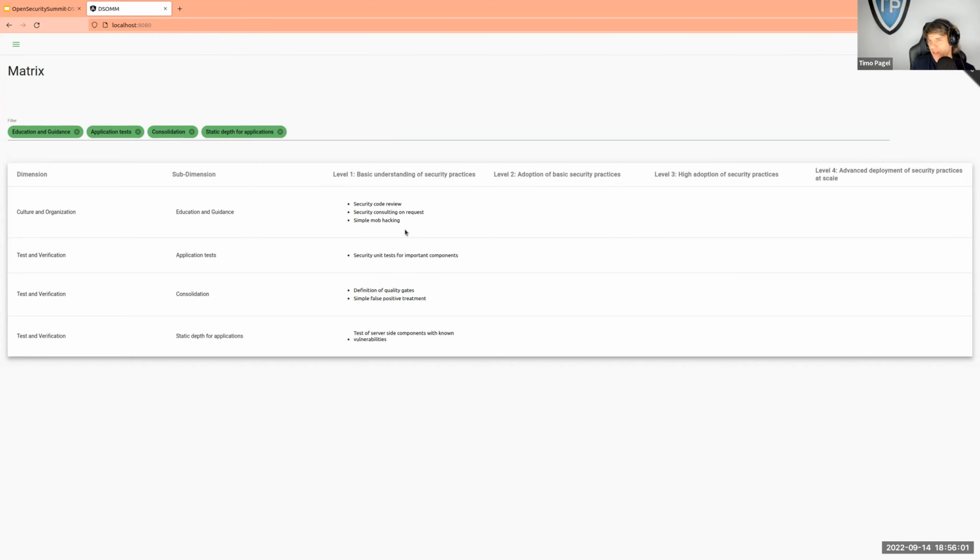When you actually implement it, each of these is like a project. And when it's a project, then you would track it in Jira, for example. But you're going to have specific tasks, right? When you talk about setting up a code review program, there are going to be 5 or 10 things that you need to do. And then if you have multiple teams doing it, you want to track where they are.